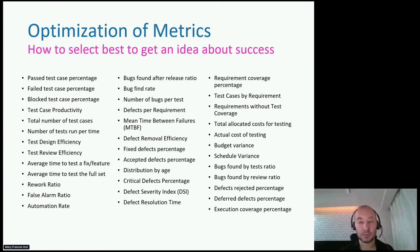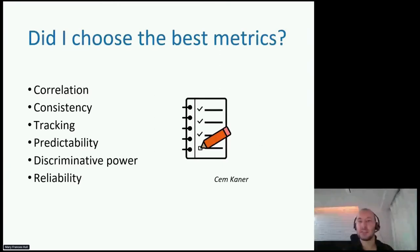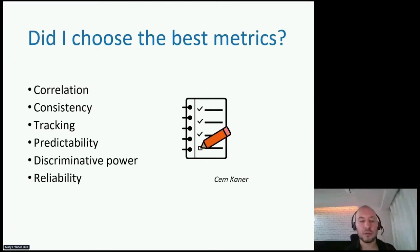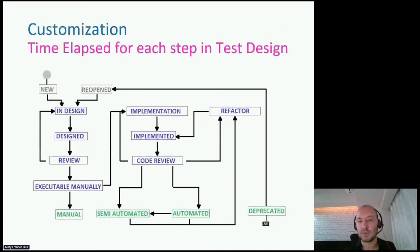The first thing is to decide on the best subset to continuously track, because it is maybe impossible to track all of them and I will lose a lot of time. But how can I decide which subset is the best one? I can use checklists like the correlation of different metrics, the consistency of each metric — whether they are reliable, predictable in time, or whether they have discriminative power. I can take these parameters as my decision factors and then decide on my subset in the best way.